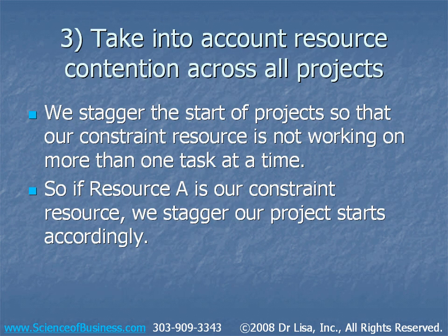Next, we also take into account resource contention across all projects, which means that we stagger the start of projects so that our constraint resources are not working on any more than one task at a time. So if resource A is our constraint resource, we stagger our project starts accordingly.